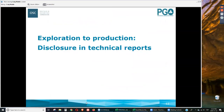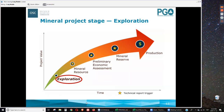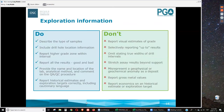We'll now go stage by stage, providing a brief overview with some do's and don'ts and the critical fatal flaw areas at each stage of development. We use an arrow diagram with the X-axis showing increase in time and the Y-axis showing project value, covering five main stages: exploration, mineral resources, PEA, mineral reserves based on a pre-feasibility study, and production. The stars on the diagram indicate where technical reports would be triggered to support each of the three main milestone events: resource, PEA, and reserves.